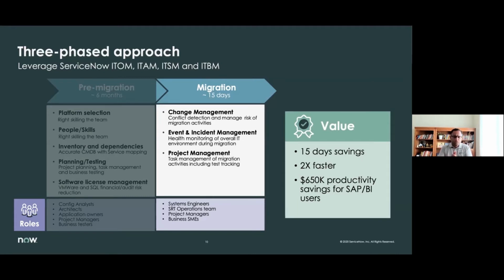So what we did was we initially started off with the sandbox migration, and then subprod, QA, UAT, all this landscape we moved one by one. We did the production in the end. The reason we did it is when we started off with non-prod landscapes, we were able to figure out how much time it takes and whether there was any problem. We ended up having some issues along the way, but we gained so much knowledge that when we did the migration, it was very smooth, and we were able to finish the migration much quicker than we actually planned.